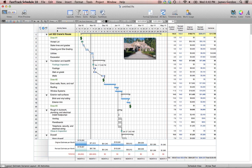As you can see here, this part of this Multiple Homes schedule is called Lot 322 Cranes House — our overall project name. Underneath that you'll see some of the beginning tasks in our project: draw number one, accept lots, stake lines and grades, etc. You'll also see when we get down to foundation and backfill, we've created a separate phase in our project and some different subtasks within that overall task. These footings inspection, footings, slab on grade, and walls are all at a different outline level and are within that phase. FastTrack is good for the most simple of projects all the way up to the most complex. FastTrack will also allow you to indent up to 64 times so you can have as complex a schedule as you need.